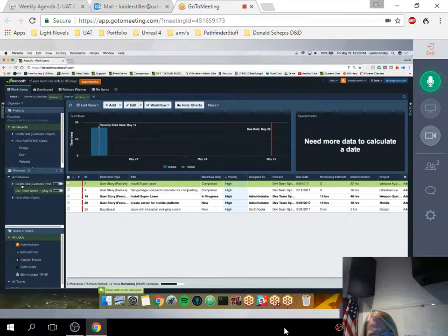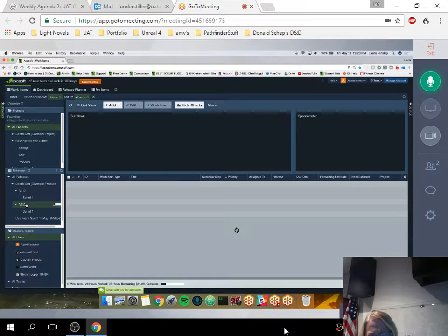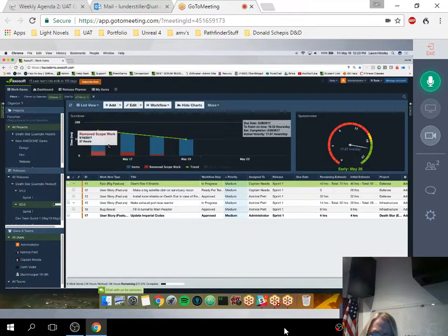So over the course of 2 days, we'll click on this V2. I mean, I'm sure you're familiar just with calculating averages. We need 2 sets of data points. So over the course of 2 days, AxoSoft will start to understand how you're working. And then you basically just need to tell the system how long it took you to complete one of these items, and you're able to start to get this nice velocity and understand, are you early or are you late for the work that's due in this week's team sprint.